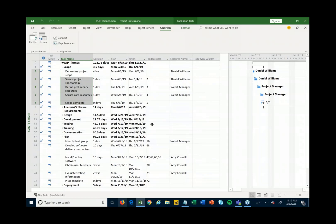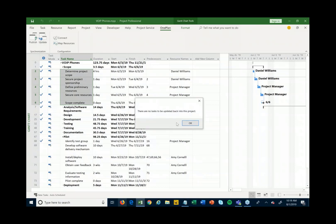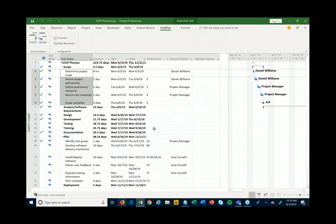As people make status updates to those tasks — say 'yes, I finished this' — or track time on it, you can then hit Update and it'll pull back any updates that are waiting, pulling those back into your project schedule so you can get status updates and the actual hours that people have been tracking on to this particular project.